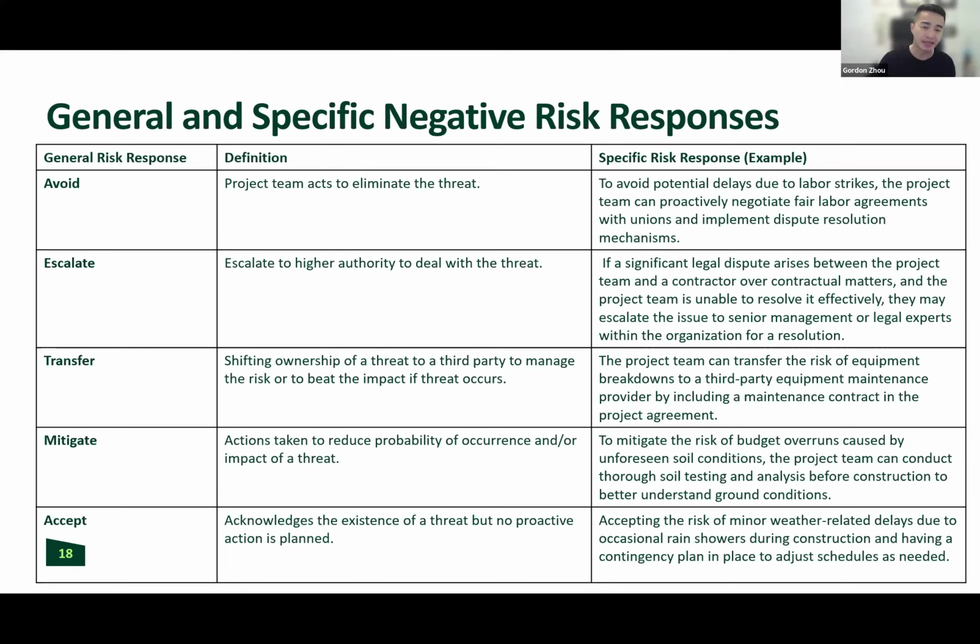Okay. Mitigate, which is the most common response, is something that could reduce the probability of the risk happening, or reduce the impact of it. So let's just say again, you're putting someone up on top of the roof, and you say, my first response is to mitigate. I'm not avoiding. I'm not transferring. My first response is mitigate.